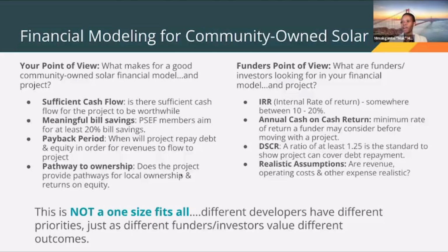This is not a conclusive list, but it gives a sense of things like your cash flow. Will there be sufficient cash flow for the project to be a worthwhile one to continue with? You might want to look at meaningful benefits and things like bill savings. Is your project actually going to result in savings for your community, and are those savings meaningful? You want to look at things like the payback period, how long until you pay off all your debt and equity and have revenues coming into the project.